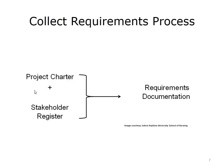To ensure project success, it is very important that the project scope be clearly defined before starting project execution. Project requirements are generated from information contained in two project-initiating documents: the project charter and the stakeholder register. The project charter is issued by the project sponsor, formally authorizes the existence and start of the project, describes the business need or justification, and provides product and project requirements. The stakeholder register contains the requirements or needs of the stakeholders, which could be for quality items, organizational processes, or directly related to the product of the project, such as performance capabilities. Requirements can be gathered by techniques such as stakeholder interviews, focus groups, questionnaires, surveys, and facilitated workshops.